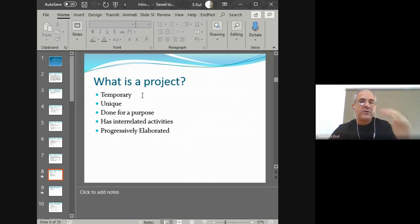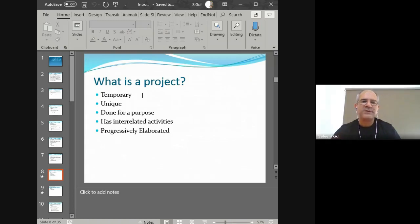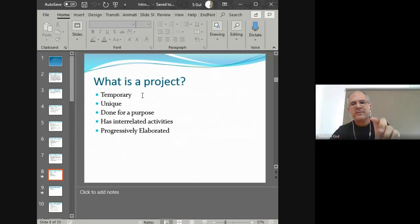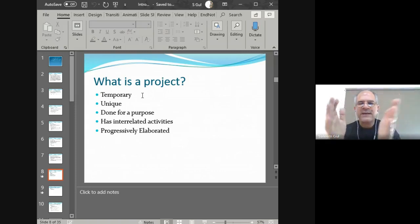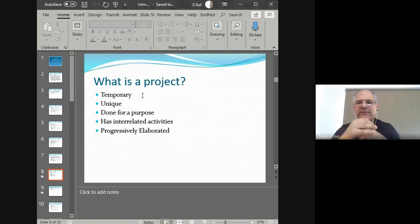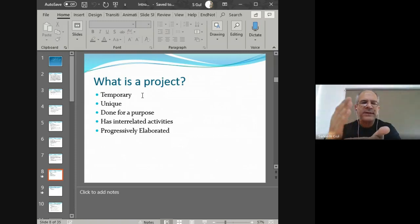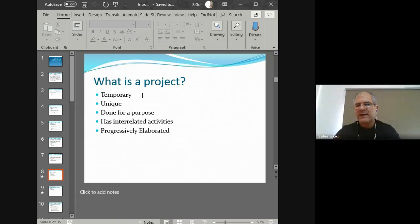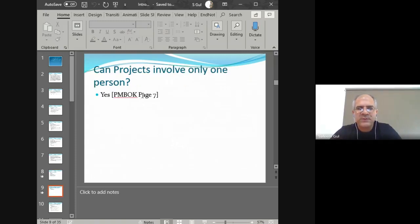These are some keywords you should memorize. When somebody asks you what a project is, you should be able to narrate these five things. These five keywords come from the PMI's PMBOK. So any time you encounter a project and someone uses the word in front of you, check it against these five criteria: Is it temporary? Is it unique? Is there a purpose behind it? Does it have interrelated activities? Is it progressively elaborated? If these five criteria are met, then it is a project; otherwise, it is not.